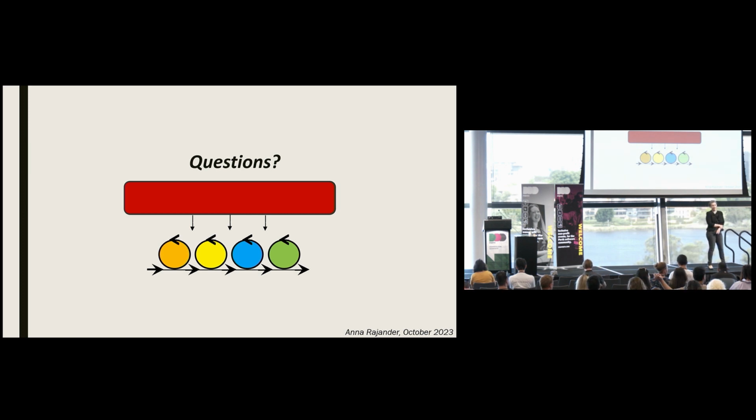Maybe one example of an absolutely stellar mix of one of those models of waterfall and agile and a massive fuck up. So Project Symphony, we eventually made it work, but it probably would have been more efficient if we thought about the council approval a bit more from the outset, because it's really those undefined processes without SLAs that are a big problem with Agile. But ultimately, we worked around it. And I think that was everybody talking together and working out what we could do, particularly from the IT side, what we could do without the batch reinstall, how we could set up sort of like your tests, stubs and all that sort of stuff in order to facilitate all that.